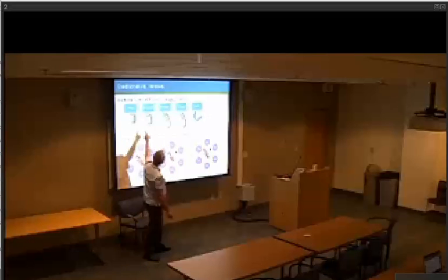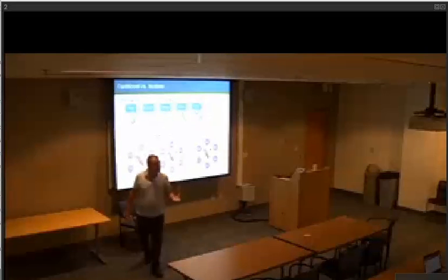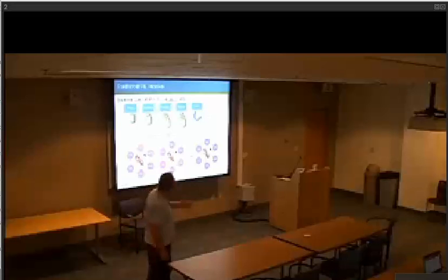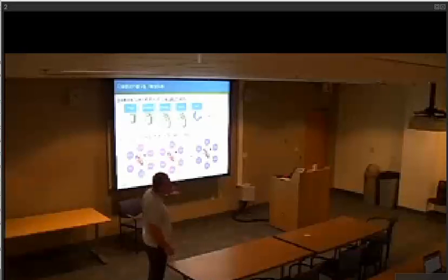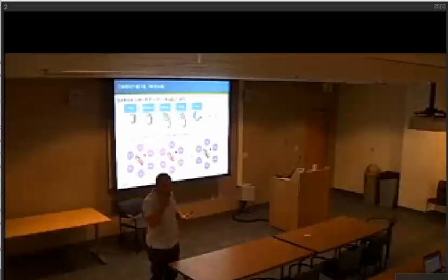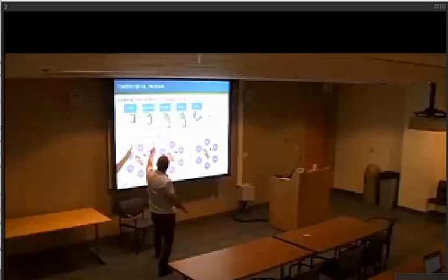versus working in stages. Waterfall works in stages. You have an analysis stage, a planning stage, a design stage, a coding stage, a testing stage, and then you're done with your product. The idea is that you finish one stage before you move on to the next.